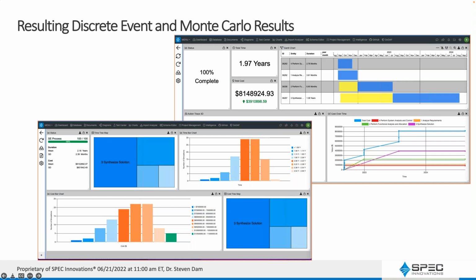And again, if you do put in the triangular distribution or some other distribution, I like triangular, by the way, because usually I can make an estimate of what's the least cost, what's the most cost, and what the mostly likely is going to be. So that's what the triangular distribution gives me. So that's kind of a nice way to use it. And then if I then run the Monte Carlo, I can get the range in terms of time and cost in particular.